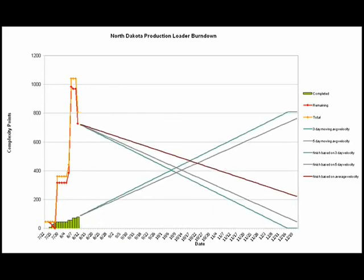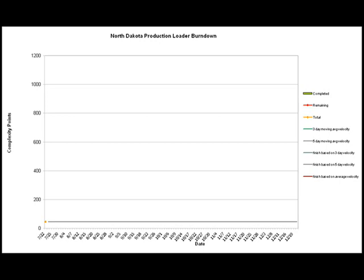Now let's go back to the beginning of the project. We started with a release planning meeting. This project was somewhat similar to a previous project, so we started by creating story cards that were copies of the stories from the previous project. Our customer also added in some new features, and the team added some technical stories of things in the development environment they wanted to improve. After creating the stories, the team estimated the initial set of stories required just to get the project set up and running — things like getting the version control system set up, an automated build in place, etc. Many teams call this phase iteration zero.